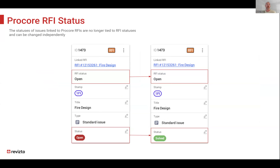Next is Procore RFI statuses. Previously, when you linked an issue to a Procore RFI, the Revisto statuses would be lost and take on the Procore RFI status. Revisto has now brought in the RFI status bar so you can see how it's linked to Procore, and we also have tracking of the Revisto statuses alongside it.